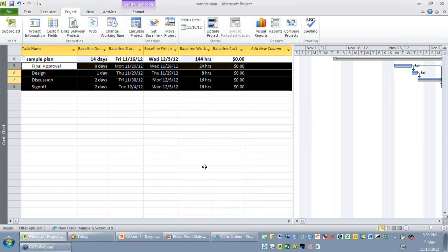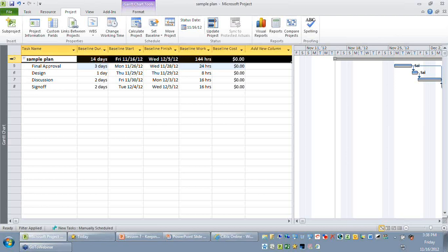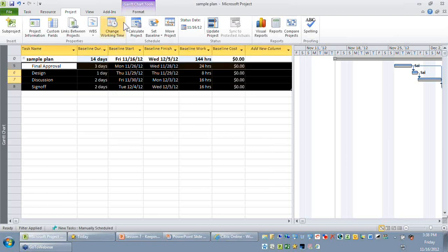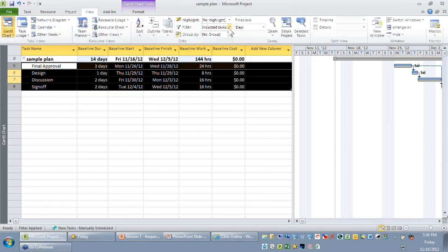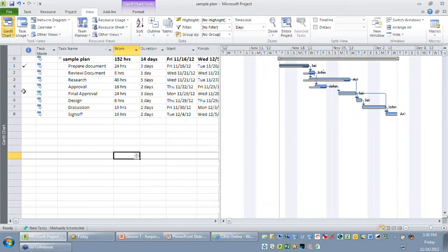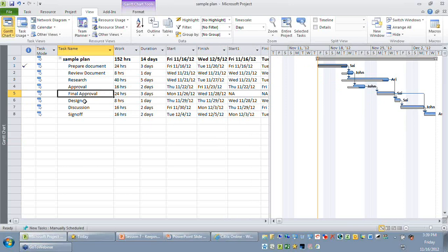Now you will be able to observe that the baseline duration and baseline work of your project summary is also getting revised, and also that the 4 tasks that got added in your project are also getting baselined. So let me remove this filter and change my table to the entry table. Now if you closely observe to your right, it's only those activities and the activities that follow that are getting baselined. The activities that are before that still have that 1 day slippage in your project. So this is how you need to take care of updating a baseline for an approved change request.